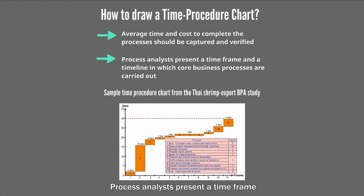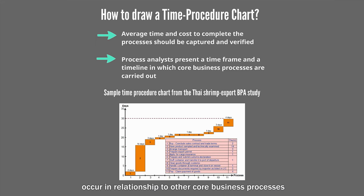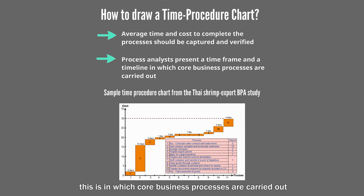Process analysts present a time frame — for example, showing the average time to complete the processes — and a timeline showing the time in which core business processes occur in relationship to other core business processes, either in sequential or in parallel. This is how core business processes are carried out in the time procedure chart.